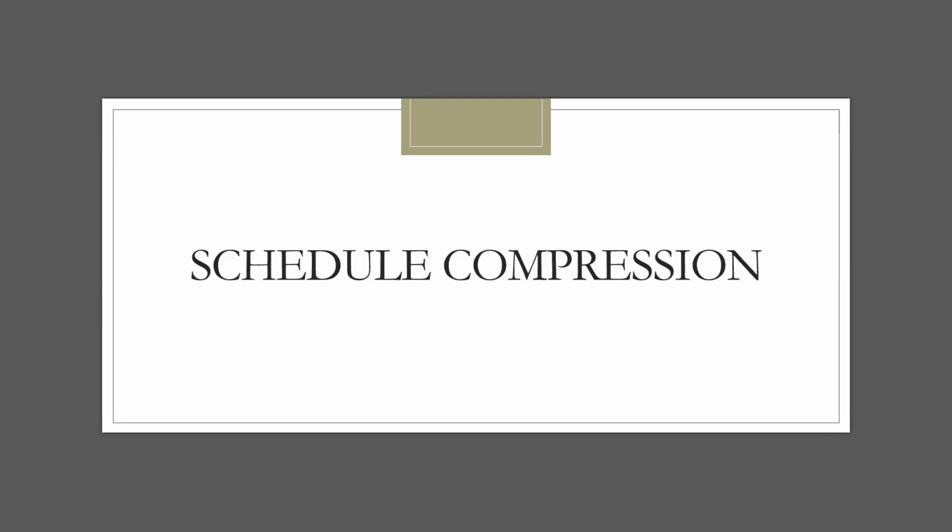Well, in the middle of the program or the project, if you want to compress it or change the go-live dates, then it surely has to go through the change management board or the change control board, and it has to get the approval from the sponsor, right? Because any of the key baseline changes, be it the scope, the time, or the cost, will lead to approval from a sponsor. Without that, you cannot proceed forward, right?